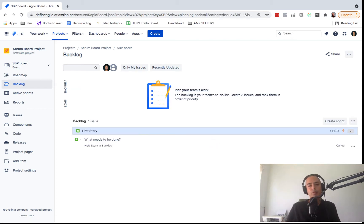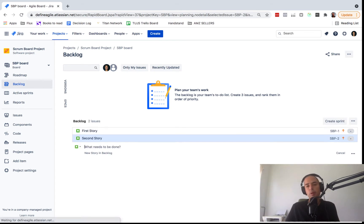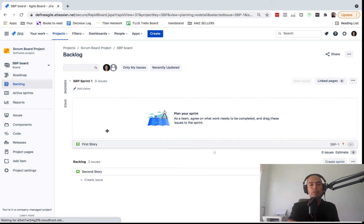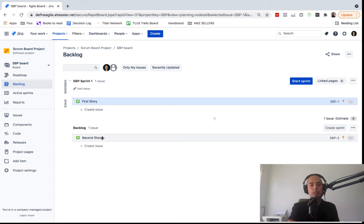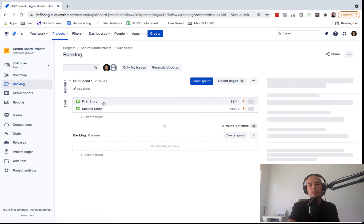Once you've created enough stories to fill an iteration — which can be one week, two weeks, or whatever timeframe you choose — you can create a Sprint and start putting your stories into it. Once there are enough stories, you need to discuss with your team, make sure everyone understands those stories, flesh out anything unclear, and make sure everyone is committed.